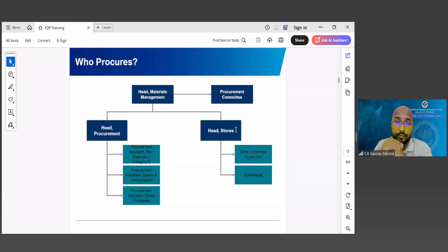This is one thing which is very important. If the scope of work is not clear, let us take one example. If we are asking for quotations for procurement of services, now there are two parts. Who will supply the material and who will supply the services? Whether you are asking for quotations for services inclusive of the material or exclusive of the material. So in this particular case, the important part is the scope of work.